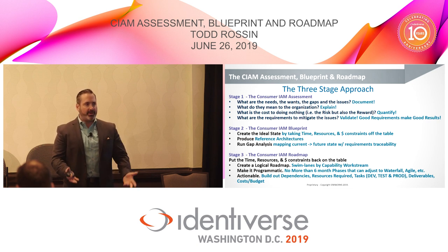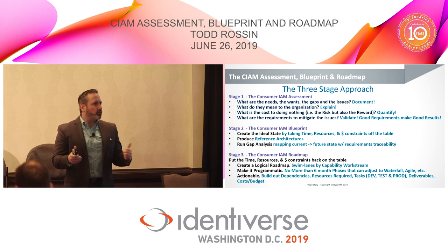Next up, variance. I said this in the last one, typical rule of thumb that we work with, for example, is 20% variance for architectural review boards, phase gate committees, whatever those things and needs are, minimum 20%.